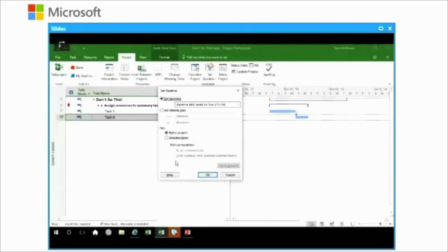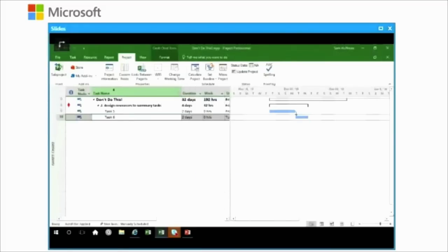Now you'll have both. You can then compare the baseline you had originally to the baseline you've got currently. And if you have to do it again, you can. In fact, you can do this, as you saw here, 10 times. And then from that point forward, you're out of luck. That's all the baselines you've got available. So in terms of the number of baselines and how they can be used, they're primarily useful for saving a historical value.